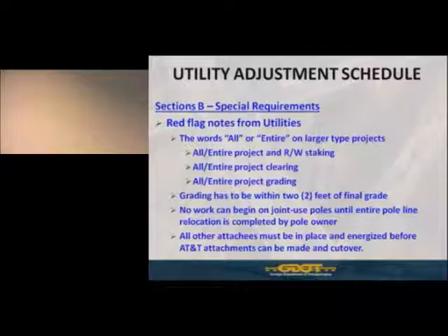But when we see language such as entire project right-of-way staking must be completed, or entire project must have clearing completed or grading prior to beginning any work. That type of language, particularly on a larger project, is going to raise some questions. And again, it may be something as simple as additional clarification to resolve it. However, just to make you aware that it will be something that will probably be questioned.